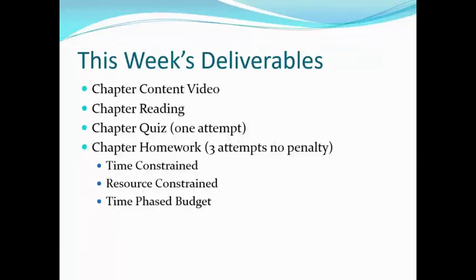A time-constrained project is basically what you finished with last week, your forward and backward pass, and you assign the resources into that schedule. A resource constrained is more difficult, and that's where you'll go to assign resources, but you don't have infinite resources. So what will happen is your schedule will actually be extended. Even though last week you did your forward and backward pass and you may have found that the project takes 16 weeks, when you go to assign resources, the resources aren't available when you need them. That'll actually cause you to extend the duration of the project to 17, 18, 19 weeks. So don't be surprised when that happens when you do that problem.